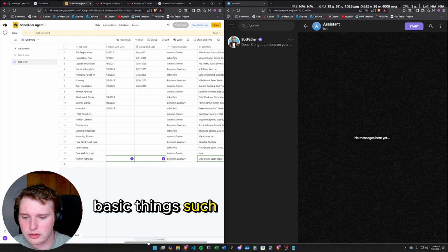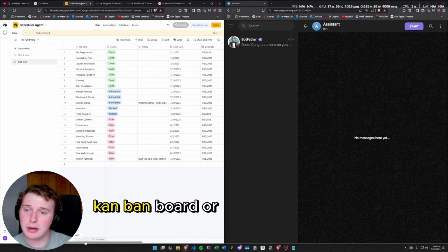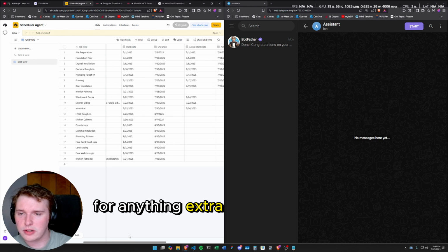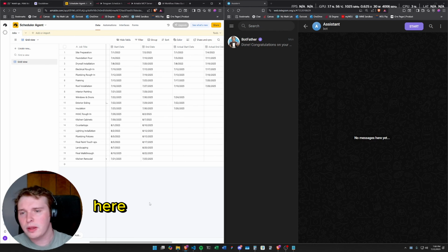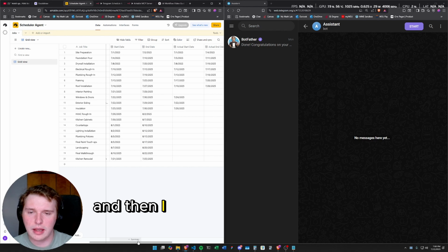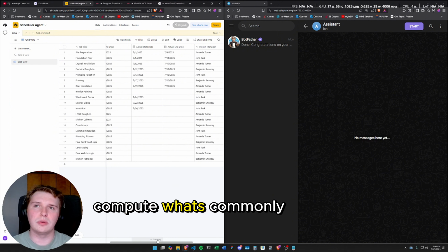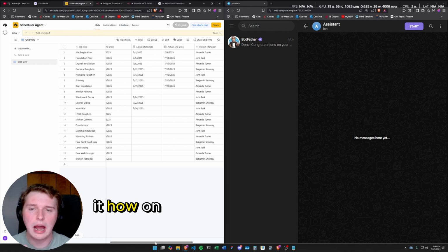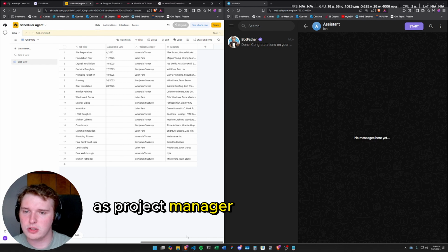We have basic things such as job title, the status of the project or job, which is something you'd find on a Kanban board or basic project management software. We have a helpful notes field for anything extra they want to store with it. And then I have two date pairs here: start and end date, and actual start date and actual end date, which helps general contractors compute what's commonly known as percent plan complete, which lets them know how on track they are with their jobs. And then other helpful fields such as project manager and laborers.